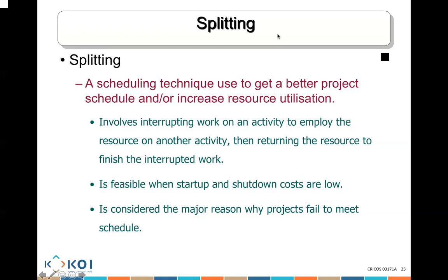So a lot of times we say, oh, let's split the activity. The only time you can split the activity is if it's not going to take you a lot of time to start up the activity again or to shut down the activity. I'll give you an example. If someone is working on the garden for me, digging a trench, and they stop and then come back to dig again, it's not going to take them a long time to set up a machine or do anything. They'll start digging straight away. If that's the case, it doesn't matter. We can split the activity.